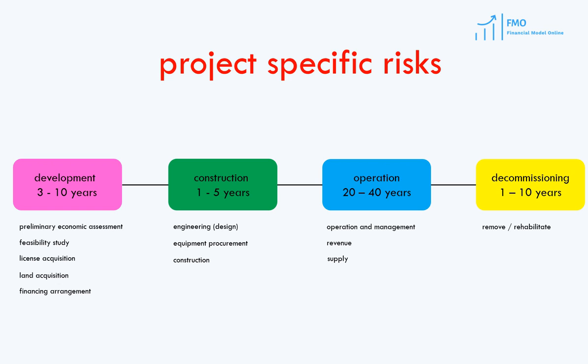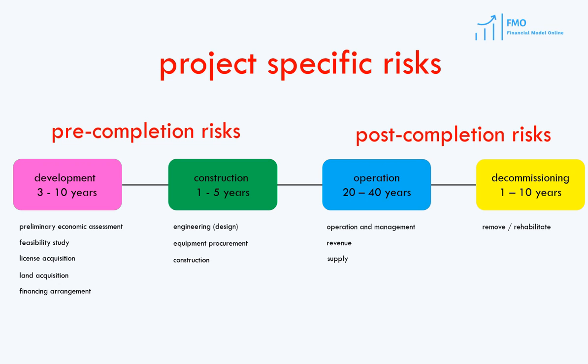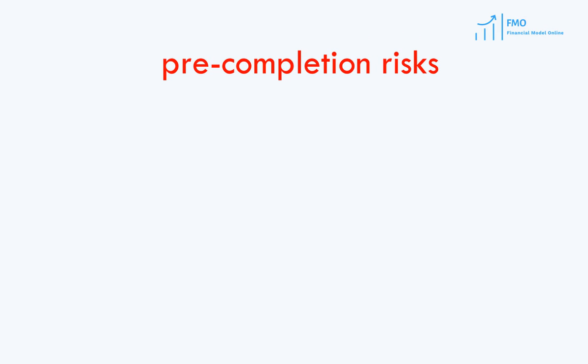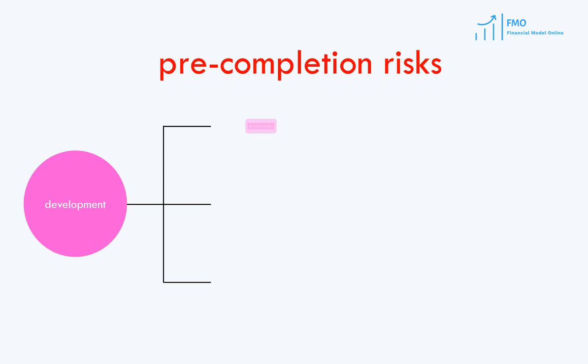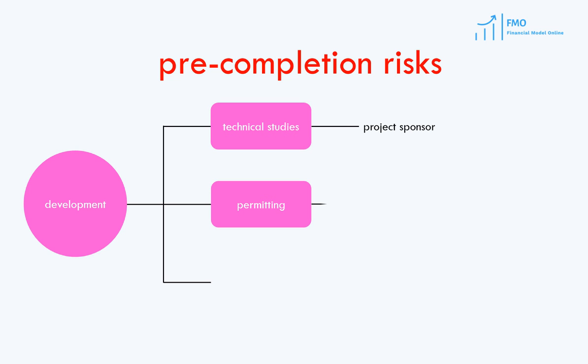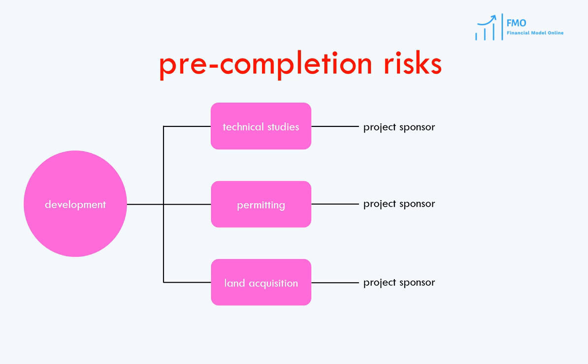Based on the project lifecycle, project-specific risks can be divided into pre-completion and post-completion risks. At the development stage, sponsors have to carry out numerous tasks to understand whether the project makes sense, obtain necessary permits from the government, and acquire the land. These tasks are costly, as multiple consultants will be employed, and at this stage the sponsors do not yet know if the project will be able to raise necessary financing. The risk is entirely on project sponsors, and it is their industry expertise and project finance transaction experience which can really mitigate the risks at development stage.